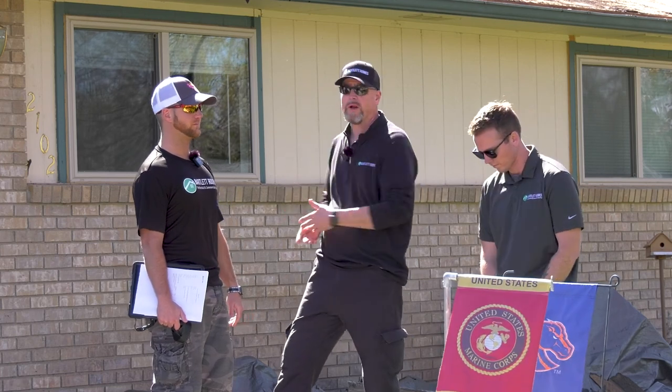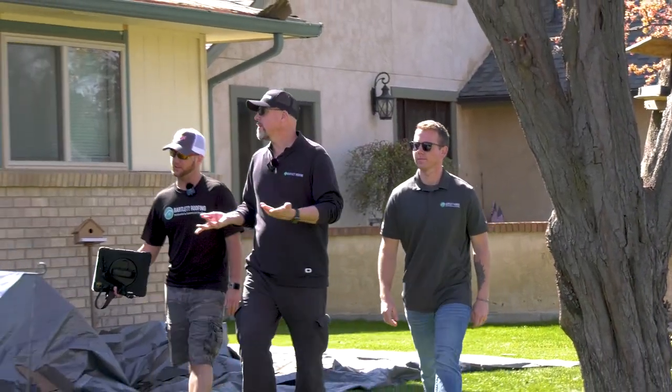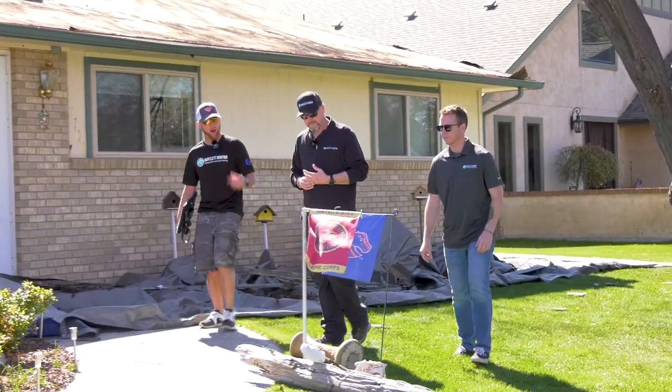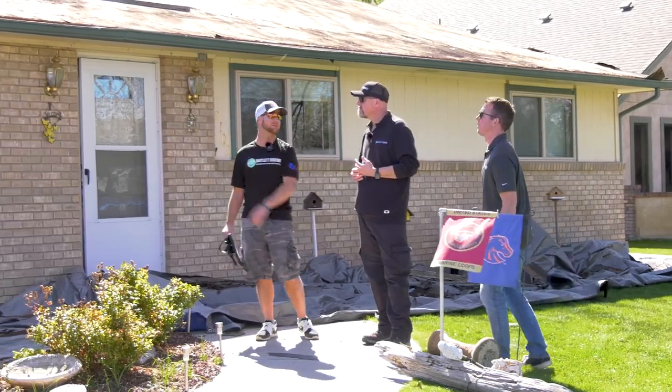The expectation is that you're going to be on your job on install day 4 times. The first time you show up, you're going to introduce your QC man to your homeowner. In this case, the homeowners are out, so there is no introduction because there's nobody to introduce. After you've introduced your homeowner, you want to take your QC guy and do a walk around. The reason for this, as we talked about before, is you know the property better than anybody else in the company. So it's your job to let the QC people know what things the homeowner finds important.